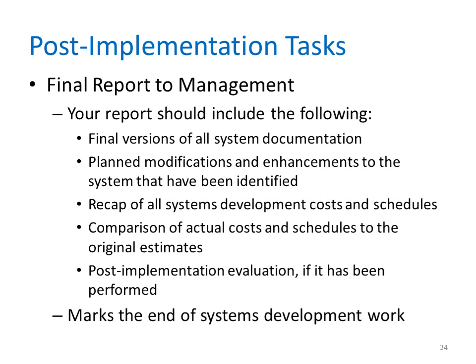At the end of each software development lifecycle phase, you submitted a report to management, and the system's implementation phase is no exception. Your report should include final versions of all system documentation, planned modifications and enhancements to the system that have been identified, a recap of all the system's development costs and schedules, a comparison of actual costs and schedules to the original estimates, and post-implementation evaluation if it's been performed. The final report to management marks the end of the systems development work.